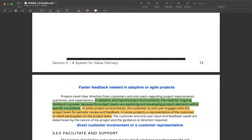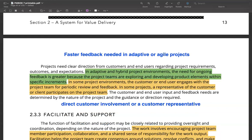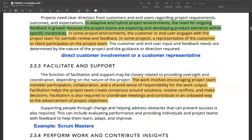When it comes to adaptive or agile projects, you need faster feedback because you're developing the product incrementally. At the end of every couple of weeks, you are creating an increment of the product and getting feedback from your end users or customers, then building on that. In some projects, it could be the customer or end user who directly engages with the project team — for example, in agile projects customers or end users can come to your sprint reviews or iteration reviews and give you feedback firsthand, without someone in between to coordinate.